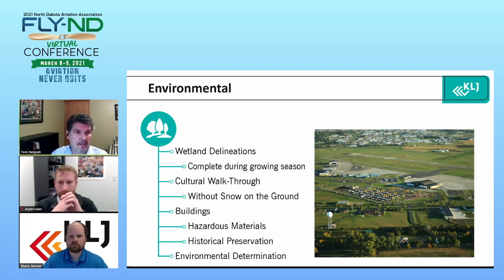There's also the cultural walkthrough where we're looking, the archaeologists, and sometimes there's the tribal aspect of it too, where they're actually looking for those cultural features on the ground. So they're actually walking around looking for cultural features. So that has to be done without snow on the ground. So they have an unobstructed view of the ground, of the area where we're possibly going to be doing the construction, borrow and waste areas, those type of things.